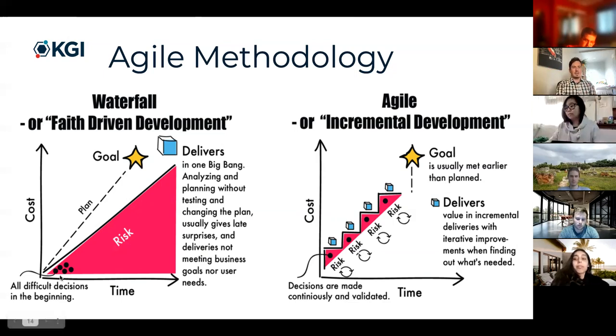And over time, you actually are taking on more risk, right? Because this is sort of sunk cost. I've devoted a lot of my people for this long amount of time. And all of the difficult decisions I made up front, right? I decided what that big bang is going to be at the end, and it's now frozen. So the longer it takes, the more I'm risking all that money that I poured into it, all those people that I poured into it. And so when that comes out, ooh, cross my fingers, right? That better work. So it's a huge amount of risk.